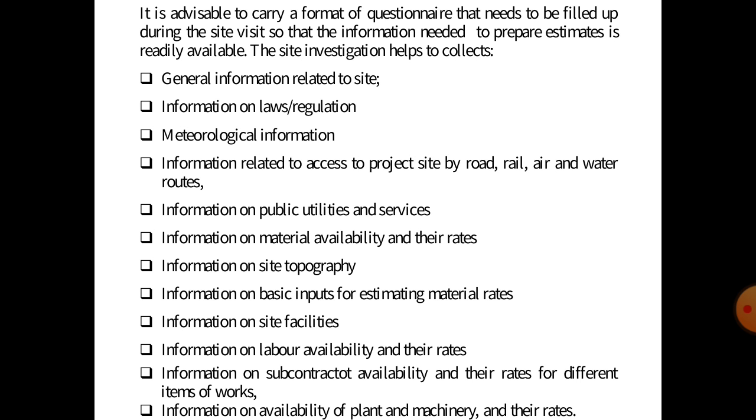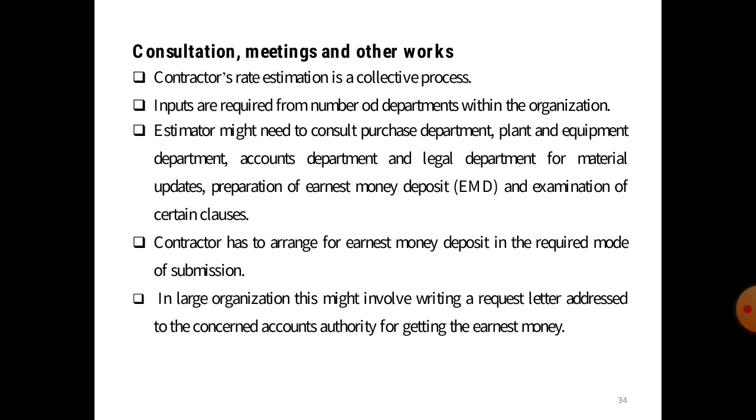information on site topography, information on basic inputs and estimate of the material rates, information on site facilities, information on labor availability and their rates, information on subcontract availability and their rates for different items of work, information on availability of plant and machinery and their rates.